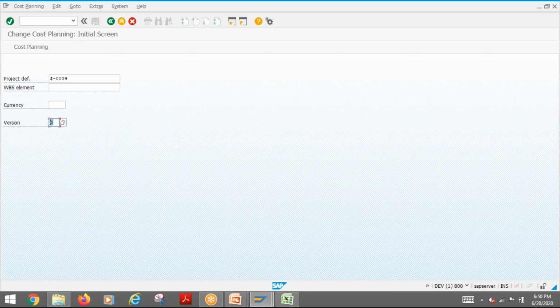So for that purpose, you can use maybe version 1 for hierarchical and version 0 for cost element, because the cost element planning is very much required to execute other functions like result analysis, progress analysis, and all those things. The other one, what we're calling is the hierarchical planning. It's just a rough cut planning, just for an information purpose, or just for a comparison.